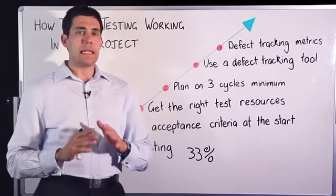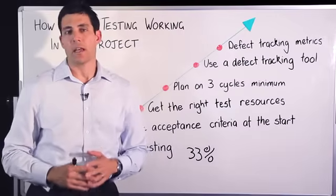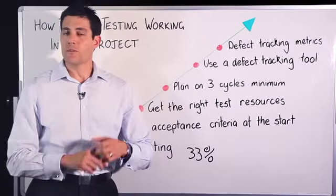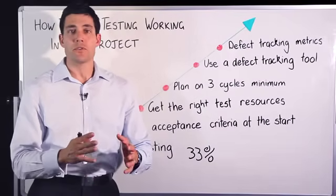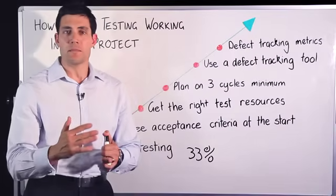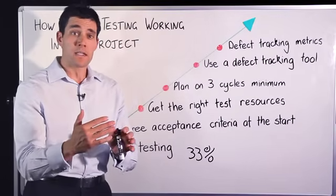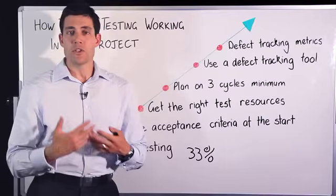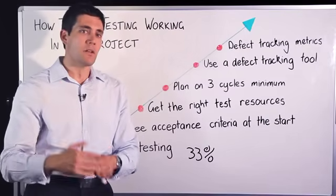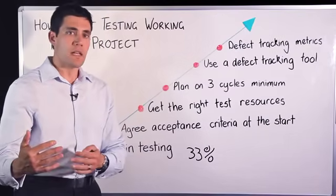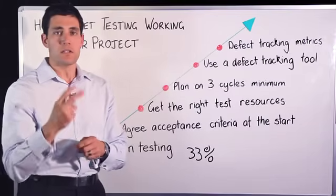Next, always allow for at least three cycles of testing on your project. You've got your own unit testing if you're doing software development that your developers do. But beyond that, they've got systems testing, which is one cycle of testing. Next one would be integration testing. So that's a separate activity. And once again, another set of testing outside of system testing. So that's your second cycle.